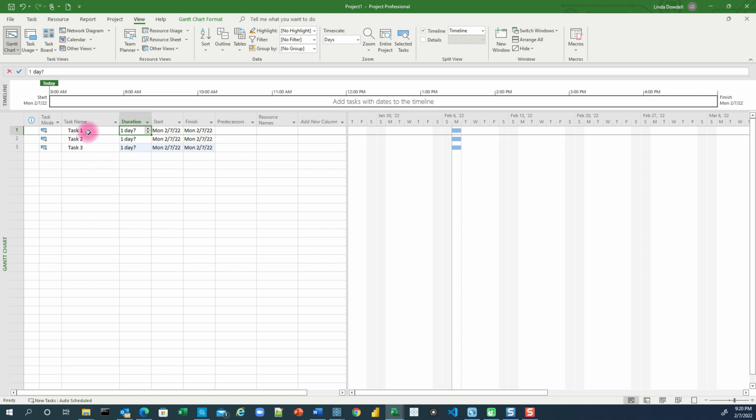So you don't have to do anything, just type in, and the system automatically provides you with the start date for that task and the finish date for the task, representing today's date or the project start date. But because I'm taking just a regular project file, it defaults to today's date. Start and finish columns, as you could see, are the same, and that represents the 1-day duration.